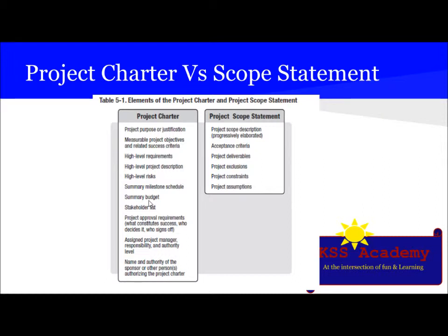And in the case of the output, it is the project scope statement, which provides a common understanding of the project scope among stakeholders, enables detailed planning, and provides a baseline. It describes all the project deliverables, the work required to create those deliverables, scope exclusions, product scope description, product acceptance criteria, and assumptions, that is, factors considered to be true, real, and certain for planning purposes, identified and validated by the team, and listed in the assumptions log.